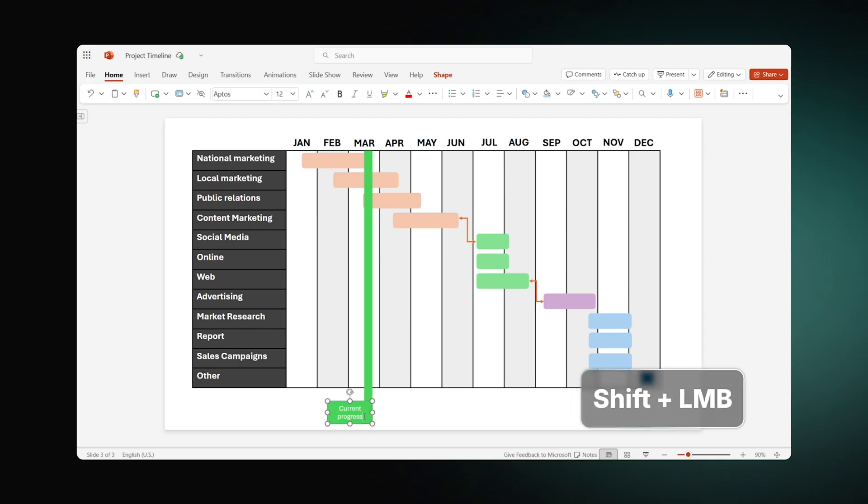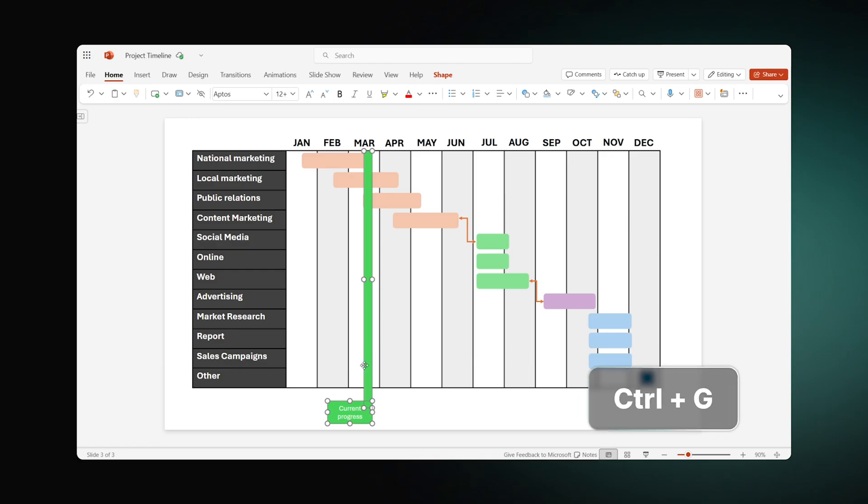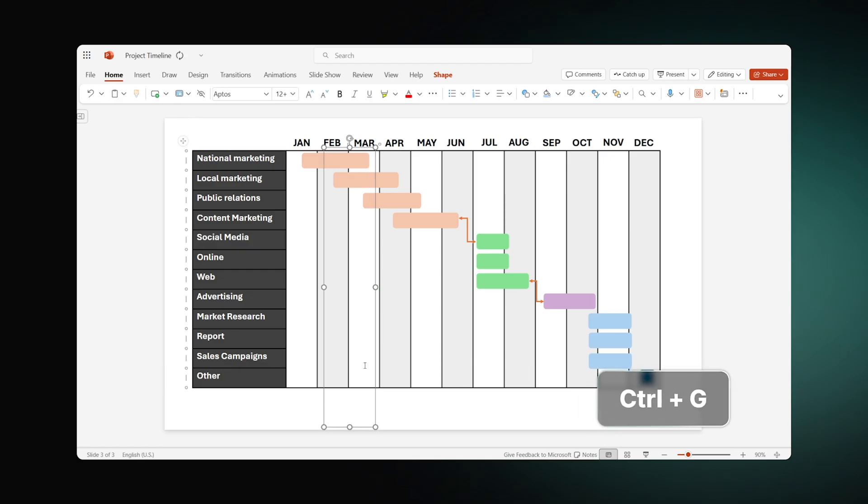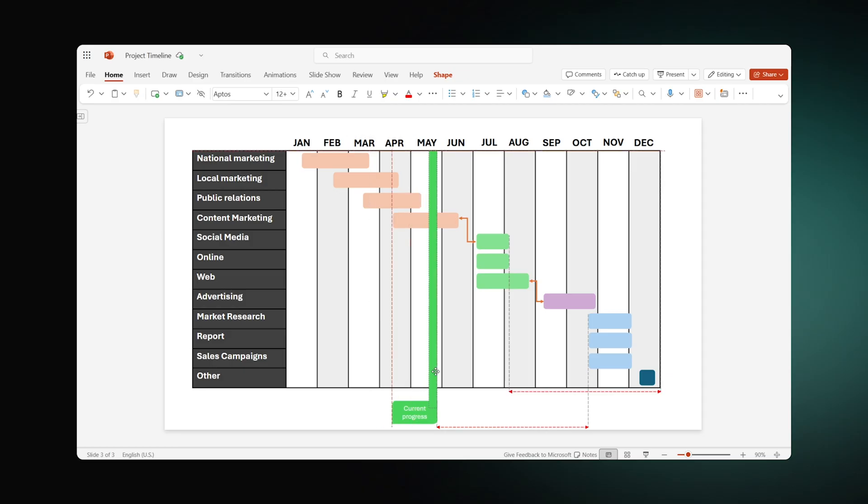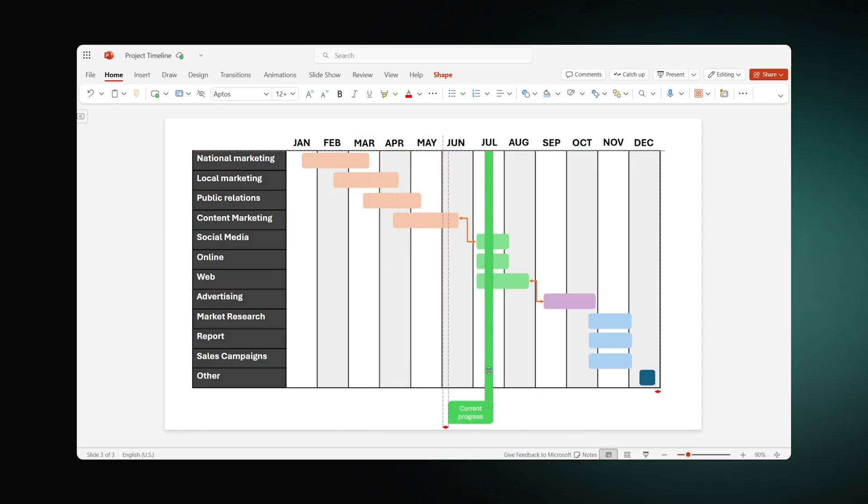select both the line and the label, and press Ctrl plus G. As a result, you will be able to slide the marker depending on the progress you've made so far.